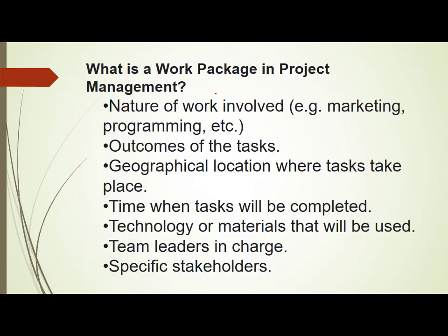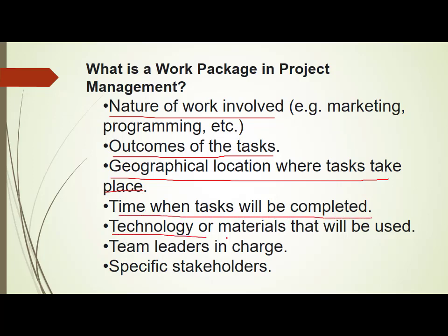So what is the work package in project management? As I told you, it contains the nature of work involved, the outcome of the task, the geographical location where the task takes place, the time when the task will be completed, the technology or materials that will be used, the team leaders in charge, and if there are any specific stakeholders. Remember that we spoke about the stakeholder power grid. So now you may have a work package which is satisfying the requirement of a particular stakeholder. Now you have to satisfy him. So that means you also have a reference to a stakeholder.